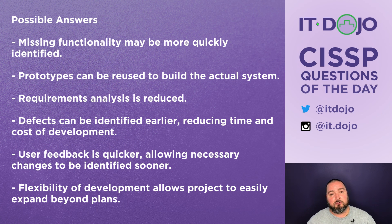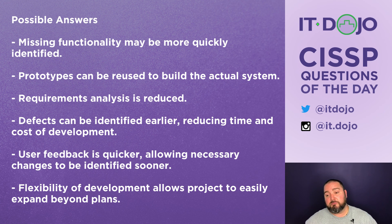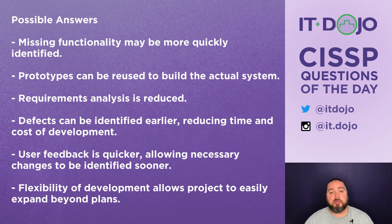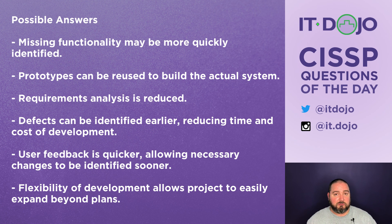That can cause confusion or disappointment with the user. One of the big disadvantages of software prototyping is feature creep, where you get too much feedback from users wanting more and more features added, distracting from core functionality. This can tremendously increase time and cost, causing you to miss the agreed-upon delivery time and go over budget. Too many successive iterations can cause significant issues with both budget and delivery.